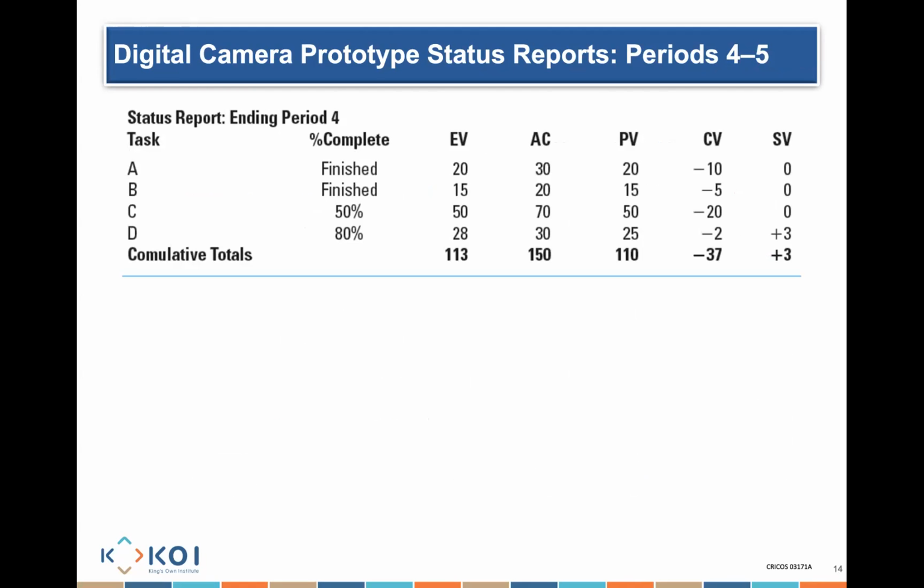So your system calculates your actual costing based on the figures that you gave it. Now, if I have an activity that was supposed to take 2 days a week at a cost of 200, but then it took 4 days a week, the system will calculate that that item is actually costing me more, and it will show you the figure of the actual cost for that item. Because when you tell the system that an activity is completed, it will automatically calculate how long it took, who we have used, because we gave it that information, and it will enable the system to calculate my costing accordingly. Does that make sense?